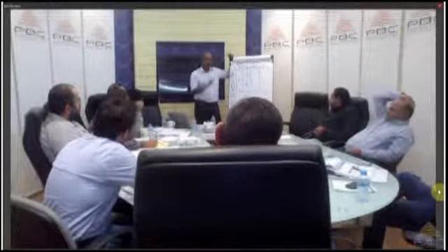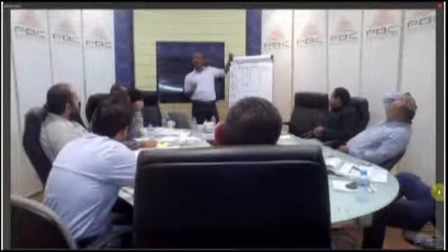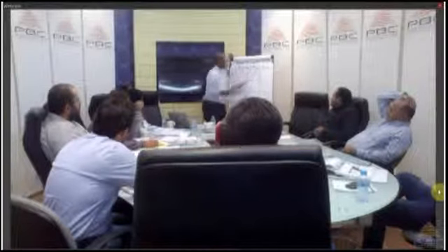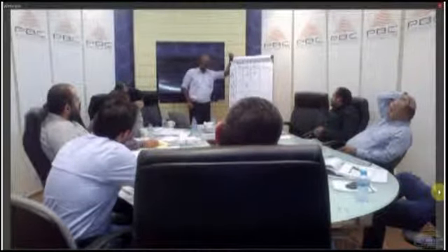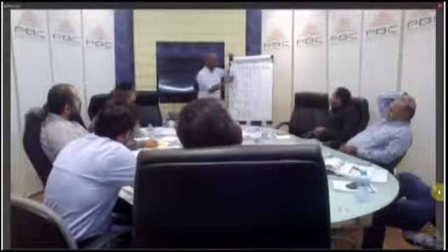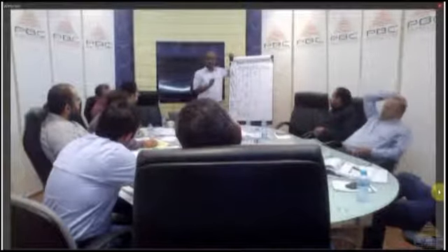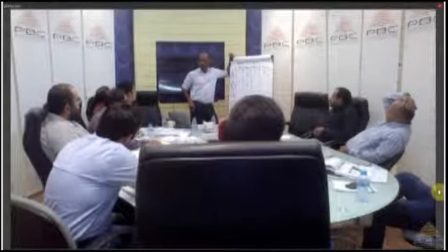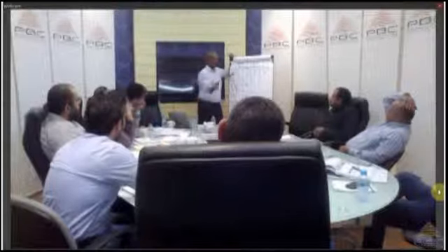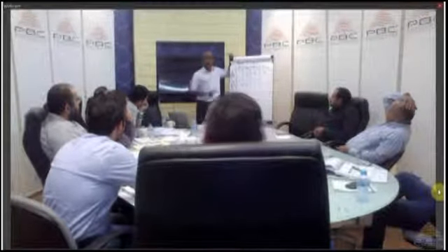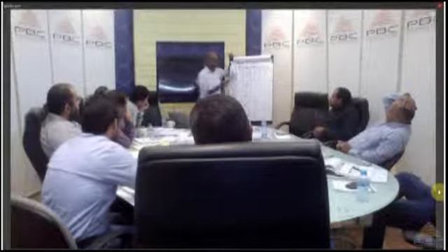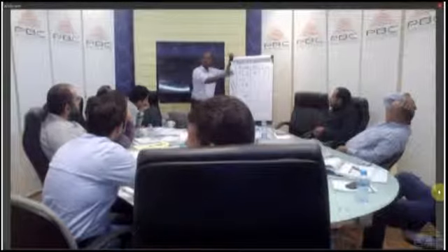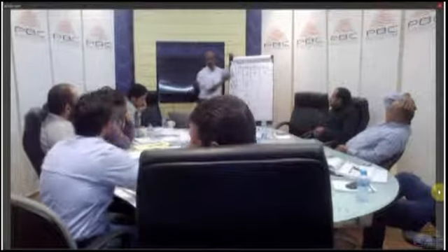Okay? Now, let's come to the actual activities. Choosing the restaurant, our best man for choosing restaurants is Wahib, let's say. So we're going to give Wahib the responsibility of doing that. So he will choose the restaurant. Osama also has some experience, so why not make him do that as well. And Abdul Hamid has been around for a long time, so he has some good ideas, but we will only consult him because he's busy. We won't ask him to actually choose, but we will consult him. So he is to be consulted.